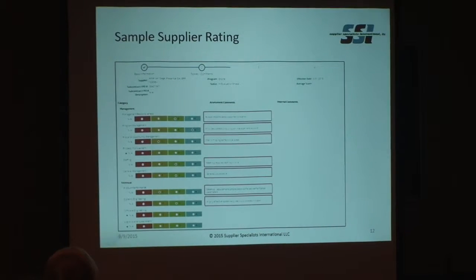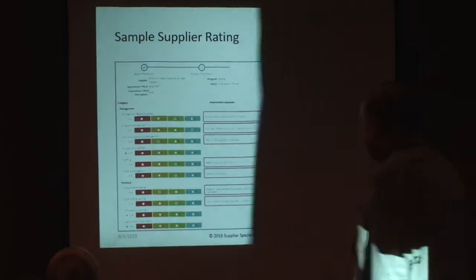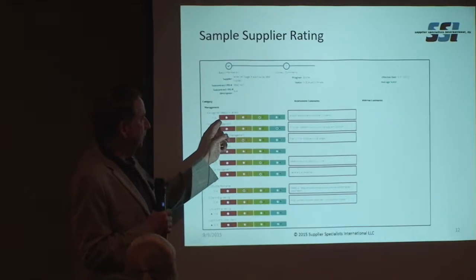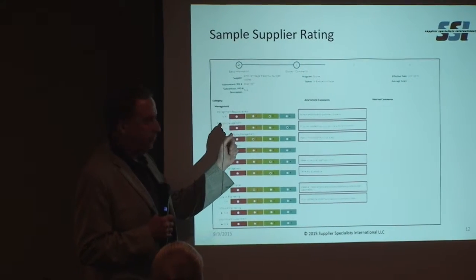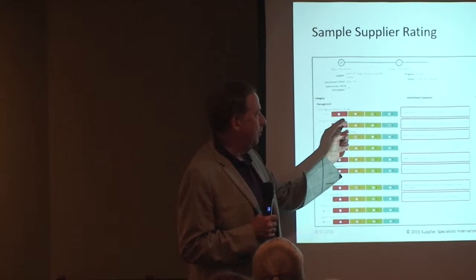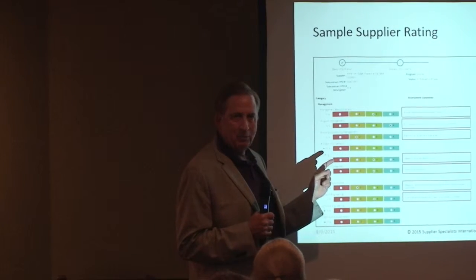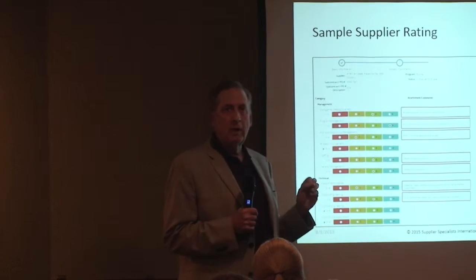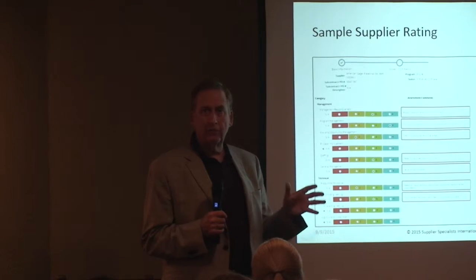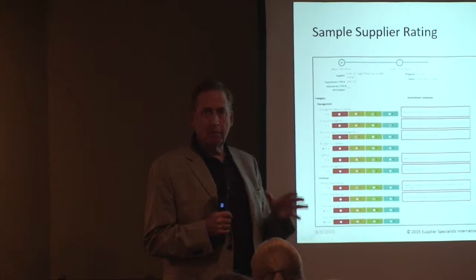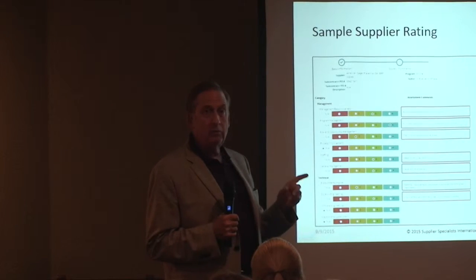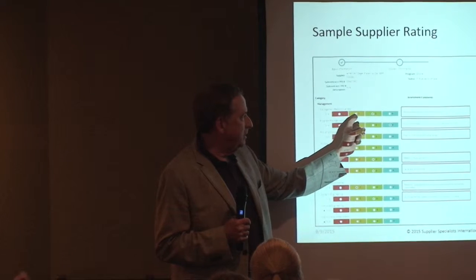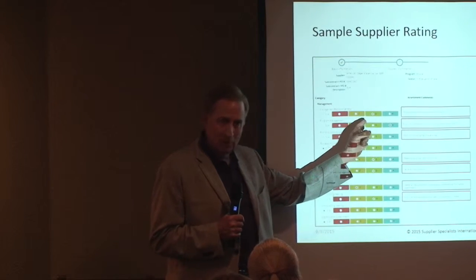Unfortunately, the resolution here isn't as good as I'd like. I think we needed a few more pixels, but a lot of these systems, again, we're kind of missing our color, but if you use a 4-color system, red means you're in deep trouble. This should be a yellow, which means it's marginal. Green means everything is fine, and blue, you're kind of walking on water. Now, interestingly enough, the Air Force has a system called the CPAR, that's Contractor Performance Assessment Report, and they use a 5-color system. So in addition to the red, yellow, green, and blue, they have a purple, which means very good.